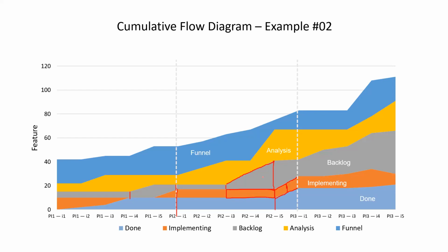So we need to check the graph or the trend between the initial stage and the first stage, and how the progress is going on. If the funnel is increasing like this in the first stage, but the progress is flat, here we have like 45 items, here we have like 80 items. 35 items got added, but what's the progress? Nil. So isn't it getting piled up on the team, becoming a bottleneck or blocker?